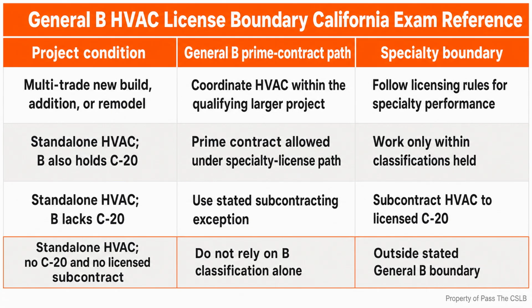Now, let's get into it. The central field decision is simple. I do not let heating and cooling equipment get selected from a square foot shortcut and then ask for paperwork after the unit is already sitting on the job. The load comes first. The equipment selection follows the load. The documents must support both.